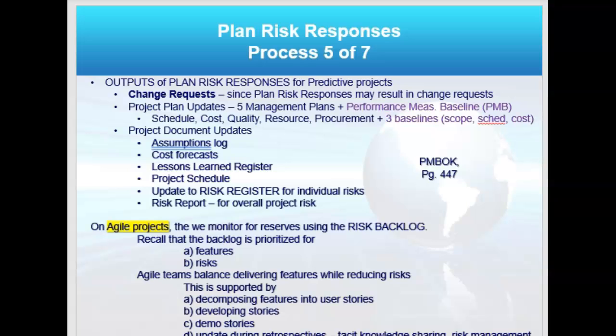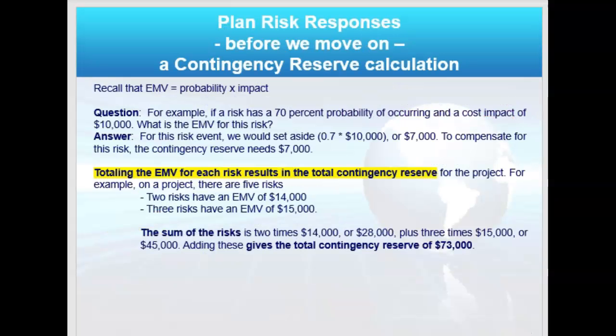And that's why you have so many face-to-face meetings, including the daily stand-up, where you're assessing what you did yesterday, what issues did you have, how do we plan to resolve them, how do we move forward today. And the retrospective is another great meeting. And your user stories are helping you to refine these features and reduce risks. Also, you'll do demos for the key stakeholders at the end of each iteration. And in that demo, you will demonstrate the feature and show that the risks were eliminated.